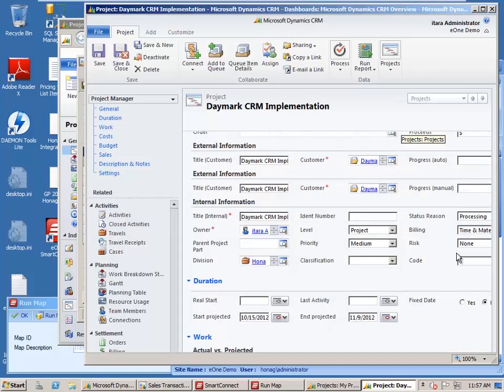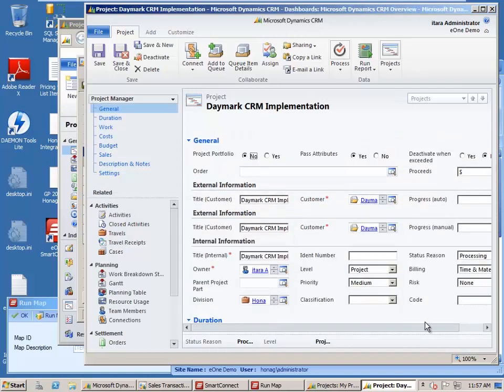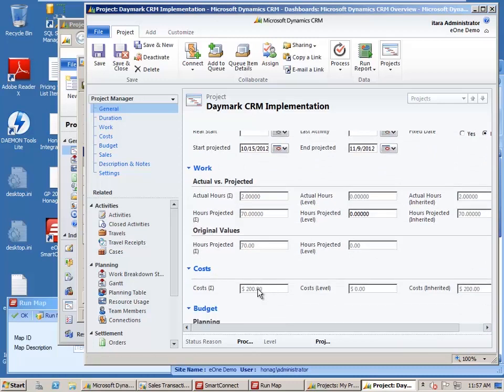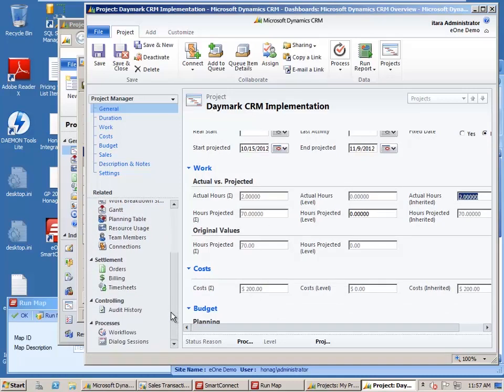We've even got our cost information showing up. Let's go ahead now and step through what we really want to see. And hopefully now that I've hit all the different servers and everything, stuff will start picking up a little bit here. First thing you want to do is go in and create a project billing timesheet. So this is going to be for the period that we want to bill our customer for.